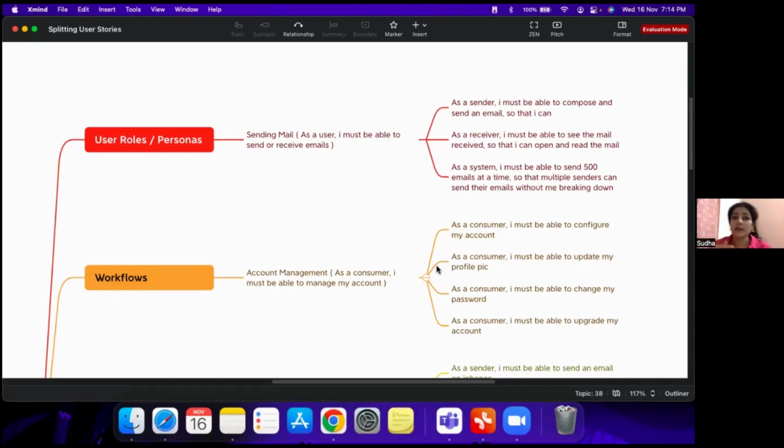Then look at a story. Okay, is it a complex story? The team feels that there are a lot of areas which look very intimidating to them. They might struggle implementing them. Then it becomes a complex story. So the best thing is don't invite those stories into your sprint backlog. Instead, split the story into 2 parts.